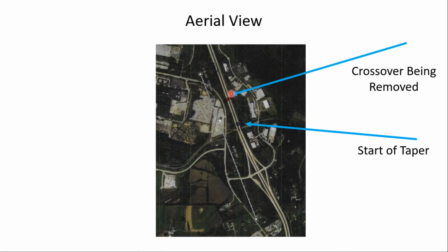This was a crossover that had been installed for the construction project, I guess to allow the contractors to move between the two roadways, also probably to allow emergency vehicle access. But now that this long-term project was completed, the contract called for this crossover to be removed. And so that's what this small crew was working for the contractor that morning to do, remove that crossover as required by the contract.